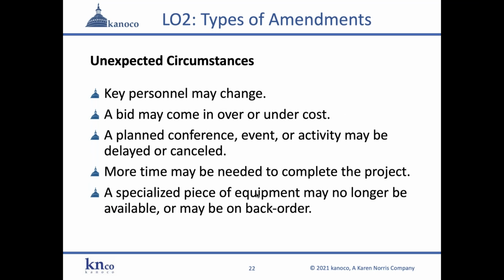So what are some of these unexpected circumstances that may occur during project implementation? Well, you might lose your project director. Maybe they've moved or they've retired, or they were in a car accident and you need to replace them. So key personnel may change. During purchasing items for the project, a bid may come in over or under cost, which might require a budget amendment. There might be a planned conference, event, or activities that may be delayed or canceled.